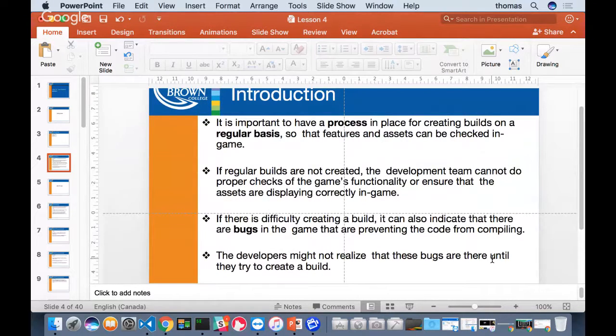For us, when we say build, I want you to narrow it down to release, okay? But release is, you're going to do release like 4 times, right? One for your first playable. You're going to have an alpha release coming up in a few weeks, which we're going to talk about. You've got your beta release, and then your release candidate or final release.